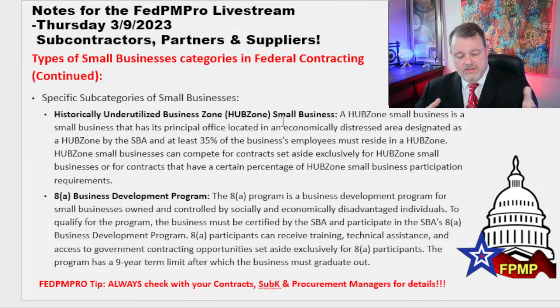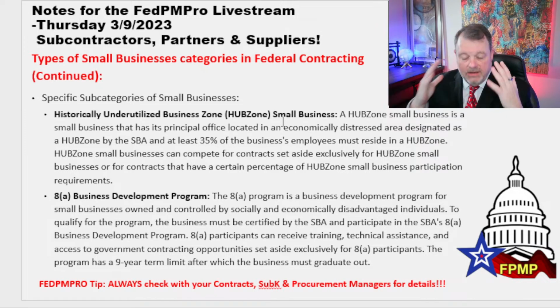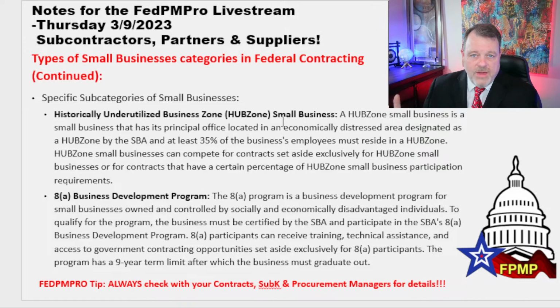And also, I will say this, if that contract falls within a contract vehicle, there also may be flow down clauses from the vehicle that has some specific set-asides. So again, this is why you need a contract specialist, and you need to be working with a subcontracts administrator to make sure that you're checking all of these boxes to understand what the contract or the contract vehicle is requiring of us as we deliver this. And I need to make sure that I hit these numbers for these small businesses with particular work share to make sure that we're compliant with the requirements for those particular contract vehicles.